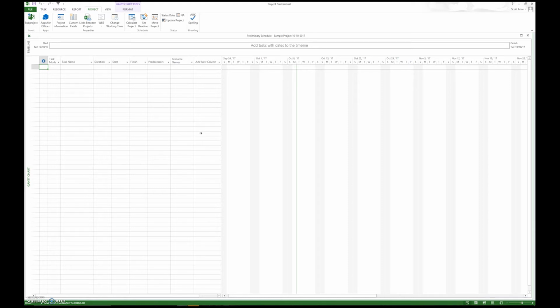The biggest mistake most people make is that they save over an old file because they use the same naming structure. Putting the date in there doesn't 100% eliminate that issue, but it pretty much removes it from being an issue with naming structure and overwriting. So naming structure is the big one, and that's what step number one is all about. We also want to set up some options in the next step.